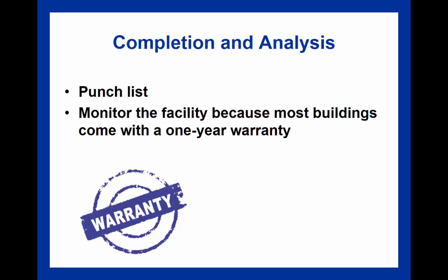That lack of proper communication, allowing the engineer and architect to actually interview and hire consultants is an issue if those interviews and hirings are excessive and inflate price. Failing to establish a hard budget and holding that builder to that budget can also inflate costs.